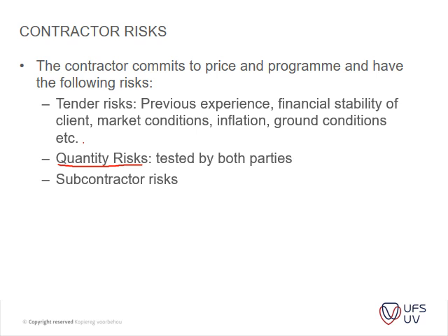And then you have subcontractor risks, guys not producing. And then obviously you have design risks. If the designers actually looked at everything, you may argue, but that goes back to the designers, but it still stays a risk, because if there was a design mistake, it's still the contractor that might be influenced. For instance, now the work has to stop while a design is fixed, so that's where your time is, RFIs and information requests is very important.